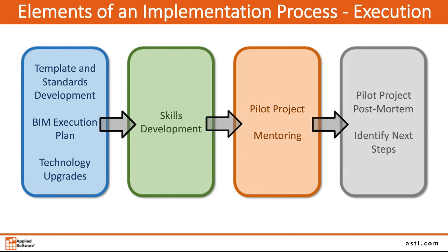And then also important is when you're done with that pilot project, sit down and have, again, an honest, realistic post-mortem. What did you do well? What did you not do so well? How would you improve what you didn't do so well on the next project? And at some point, your implementation is going to be more stable. People are going to be feeling more comfortable with it. You're starting to see things work, and that's when you start to look for, okay, where do we push the envelope? What you want to adopt is what I call a culture of continuous improvement.